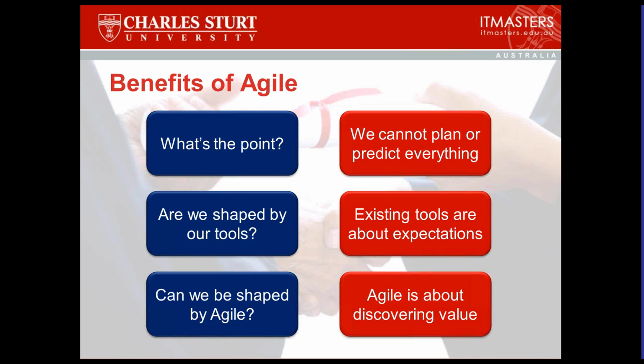So in the software project example, you do have dependencies. You have things that have to happen. A has to happen before B. These fundamentals are going to strategically influence the sequencing or the large-scale chronological planning and scheduling that you put into things. So we've talked about iterations, and you might turn around and say, well, these things are dependencies for other things. So we're going to look at those in the early iterations, and we're going to work on those in the early part because we're going to need to.